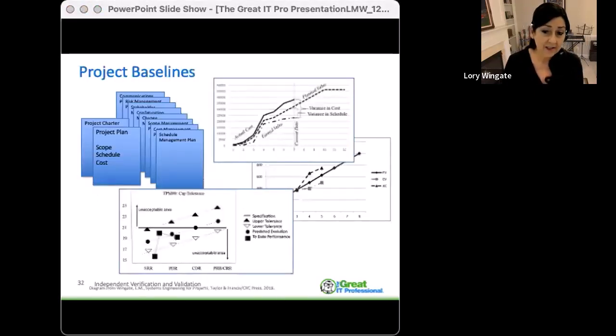And depending again on the life cycle of the project, your baselines could be simple or highly complex, incorporating earned value methods and technical risk reduction strategies. Remember, the project baselines are the key measurement areas that are important to the project and demonstrate a starting area for which all progress and change are vetted. These can be lightweight, or they can be rigorous, such as with the use of full earned value management and technical performance measures. At a minimum, though, having established baselines for cost, schedule, scope, and quality are essential. And those come out in your verification and validation measures.